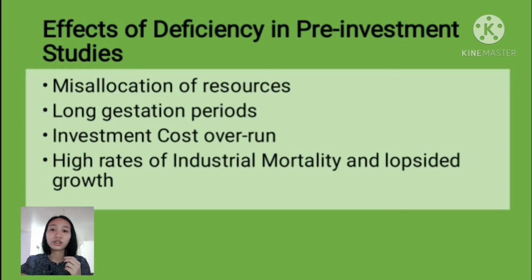Next we have long gestation periods. Gestation period is the period between the start of an investment project and the time when production using it can start. If pre-investment study is not done properly, this could take longer than usual. And then we also have investment cost overrun, high rates of industrial mortality, and lopsided growth. So in a nutshell, if pre-investment study is not carefully done, it will cost the business an inefficient use of its resources, its time, and eventually increases the risk of having a failed venture.